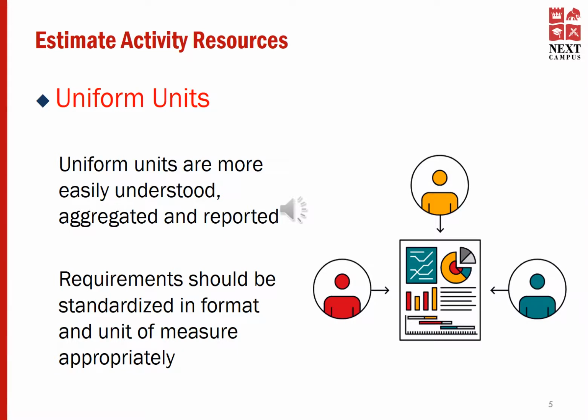It's important that you use uniform units in estimating activity resources. That's because these uniform units are much more easily aggregated, reported, and understood. It's okay to use whatever measure works for you, but they should be standardized. Throughout the project, it needs to be the same measures and units used.